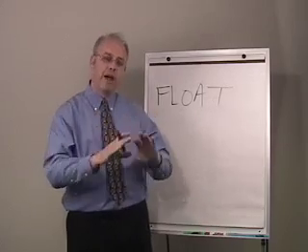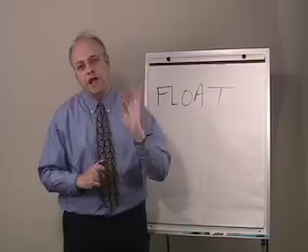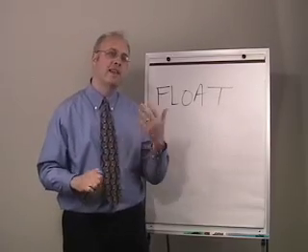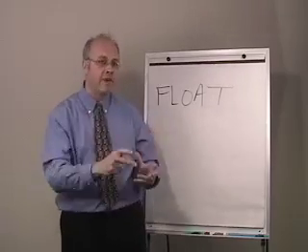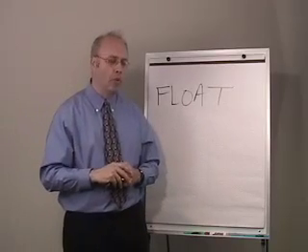So again, the bottom line here is focus clearly on your contract. Read your contract to see what it says about float, and recognize that statements like "you must start and finish your work by the early dates" have the effect of taking away any float you may have had associated with your work.